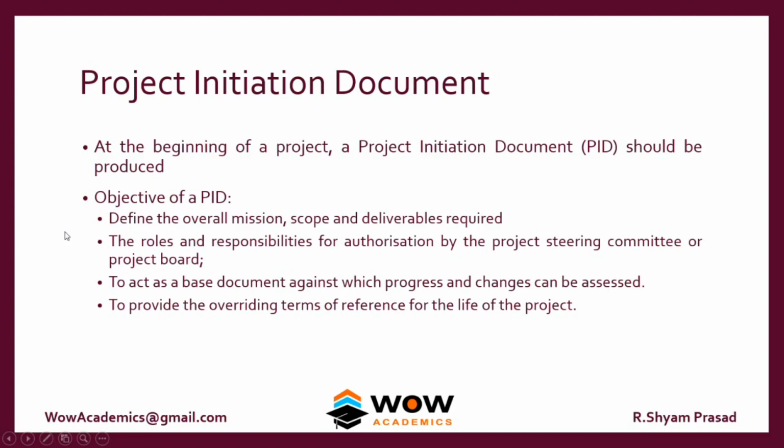The project initiation document tells everything in detail, like what work is to be carried out, when it is to be carried out, in what time the work should be carried out, who should do the work, what is the subcontractor's role, what is the supplier's role. It gives a very detailed picture of how the project is to be executed. Every project, while it is being executed, will be periodically compared with the project initiation document in terms of time and budget, and in terms of the scope or quality of the project, that will be compared with the business case.